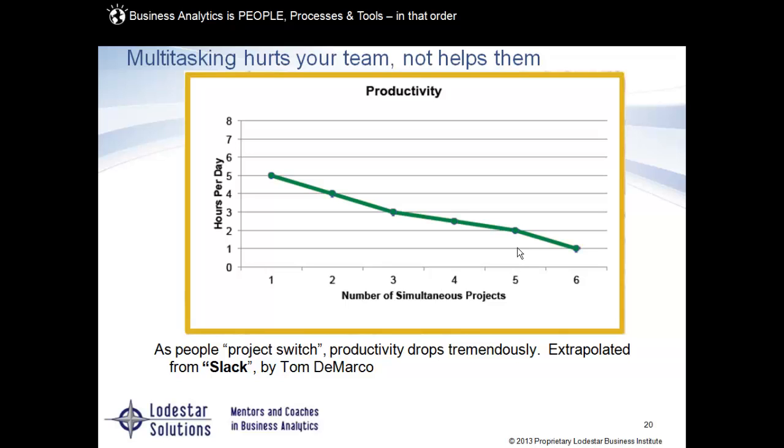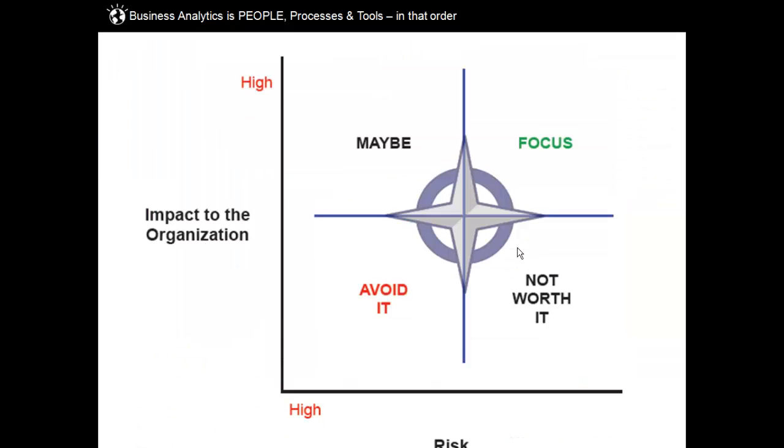Even if you have 5 projects that you're working on, it would be better for you to block out one day for project 1, another day for project 2, another day for project 3, instead of dedicating 20% here, 20% there. So when we go to clients and they say, well, I've got 20% of Lisa, 20% of Becky, and 20% of Heather. Well, that's an hour. I can count on an hour a day from that 20%. That's all I'm getting. I appreciate that I'm trying to get more help, but I would rather have one person that's dedicated than 5 half people. Does that make sense? How do we decide what we work on?